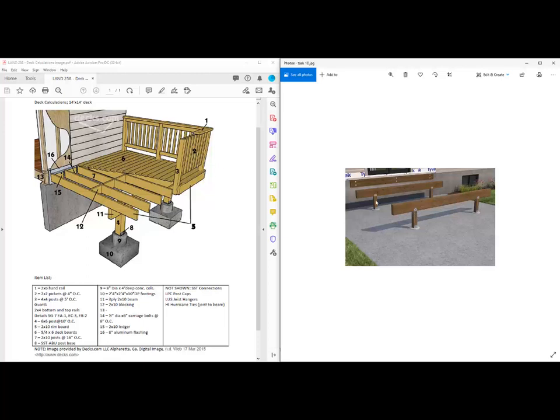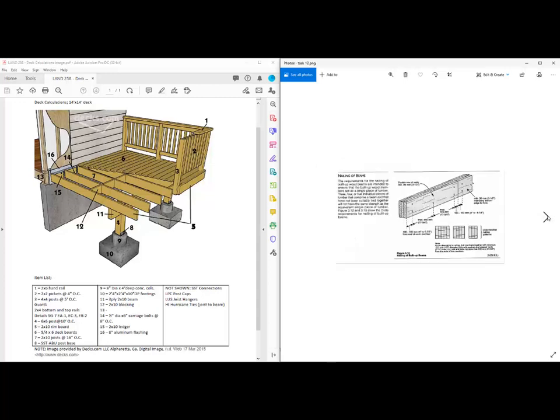Task number 10 is setting these wood posts to make sure they're done correctly. I like this technique because after you set the posts, you can cut them to the right heights. This is a better technique - I think it's easier than bringing the sonotube all the way up to the underside of the beam. There's some extra mechanicals involved in that, but you can really get perfectly accurate. I think it's more user-friendly and less likelihood of having problems. We have to set the posts into the saddles, and once we do that, we'll level the posts by cutting them to the right height. The posts are going to support a beam - a built-up wood beam. The built-up wood beam is a process you do on site, so it can actually happen at any time. We could do that way before we get to the point of installing it. It's an independent task that could start at any time, not part of the critical path.